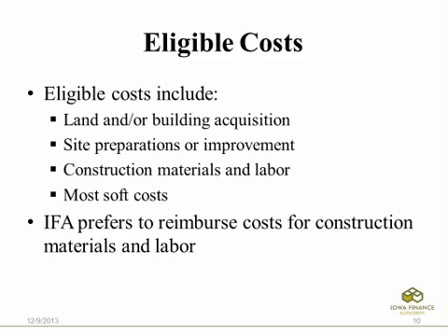Eligible costs in the project. Eligible costs include land and or building acquisition, site preparations or improvement. Be real careful with home funds in a project. Anything off the site is not home eligible.